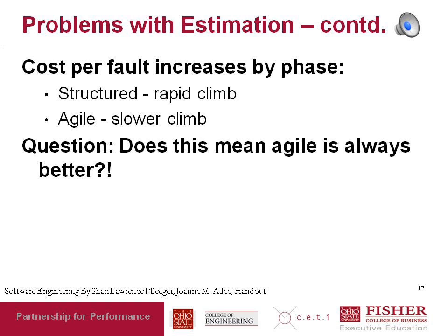So basically, if your estimations are wrong, if your estimations don't include some element of the system or some element of the project early, the change in estimate, the change in effort or cost is huge if you discover that new problem or that new feature or that new issue later as opposed to earlier.